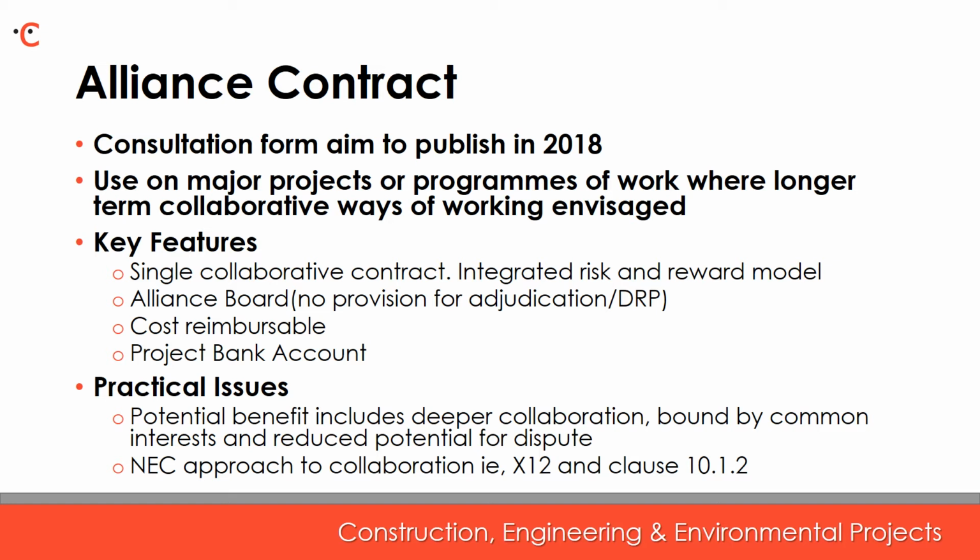And so the alliance contract, now published in consultative form, is a response to the NEC users who preferred, historically, a single form of contract for alliancing to allow all parties to enter into the contract under the same terms and conditions. And whilst the alliance contract adopts the same principles and structures as other NEC contracts, it does incorporate this integrated risk and reward model.